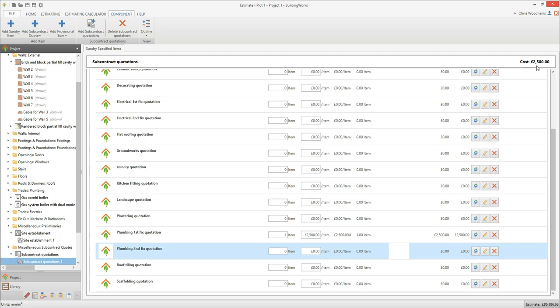I'm also going to add a plumbing second fix quote, so I'll type in a rate quantity of 1 and then enter the item cost of £1,200 into the item cost box. You can add as many subcontract quotations as you need in this way.